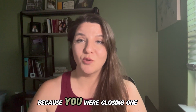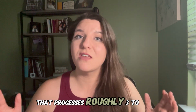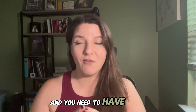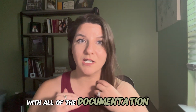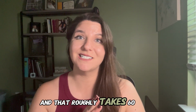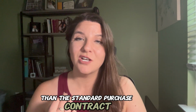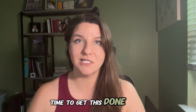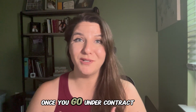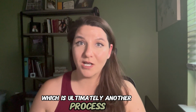Usually with OTC loans, because you are closing one time on land and the construction draws prior to closing, that process is roughly 3 to 4 times the amount of paperwork, and you need to have all of that put together. You need to build the house out of paper before you close with all of the documentation. And that roughly takes 60 to 90 days at minimum. So that is longer than the standard purchase contract. So you want to make sure that you're going under contract and giving your team enough time to get this done without causing delays. Once you go under contract, the next step is starting the loan process, which is ultimately another process in and of itself.